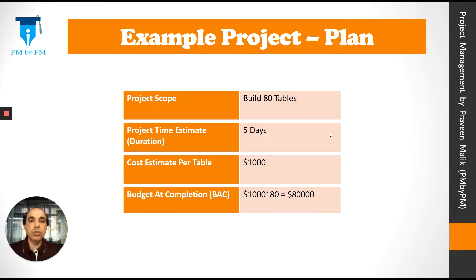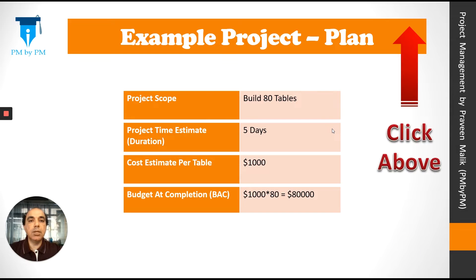Let's go back to our example project. The plan was to build 80 tables in 5 days. Our estimate was that it would take $1,000 to build one table. The total budget, or BAC, came out to be $80,000. You can click on the card above to see the details of this example project.